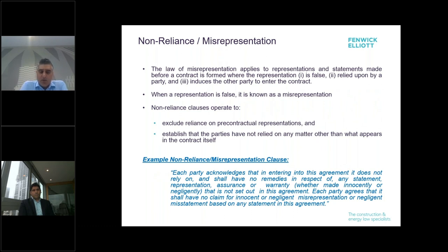Now, because the non-reliance clauses are intended to deal with misrepresentations, they serve a slightly different and distinct purpose to an entire agreement clause. Trying to combine the two clauses is potentially hazardous. However, I do on occasion see entire agreement clauses making references to representations. Now, the law of misrepresentation is quite a complex area. I'm not going to go into that in particular detail. But it applies to representations, i.e. statements that are made during the negotiations,